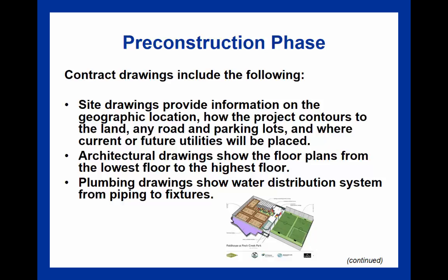And this might be done through a construction bond, which is basically an amount of money that is placed into some sort of trust account that ensures, in the event that something goes wrong with the build, that the prospective owner can be made whole, that they can collect on that bond. And sometimes that bond needs to be paid out. So that's also important to make sure that a proper contractor is selected that is able to, one, put forth that bond, and two, do everything in their power to avoid that bond being exercised pursuant to the terms of that contract.